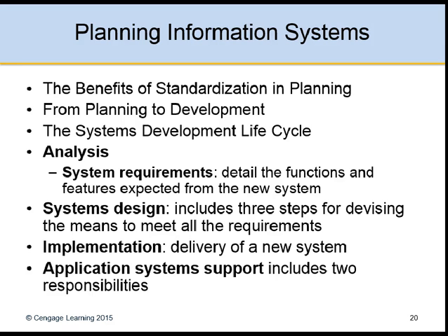Construction consists of mostly programming activities and may take months or years. Each completed module is tested, and then the modules are integrated. System testing is the test of the entire integrated system, comparing results to the system requirements. The testing period often is compressed due to schedule or budget issues, and that results in poor testing, and that can result in a system that has bugs after it's been implemented.